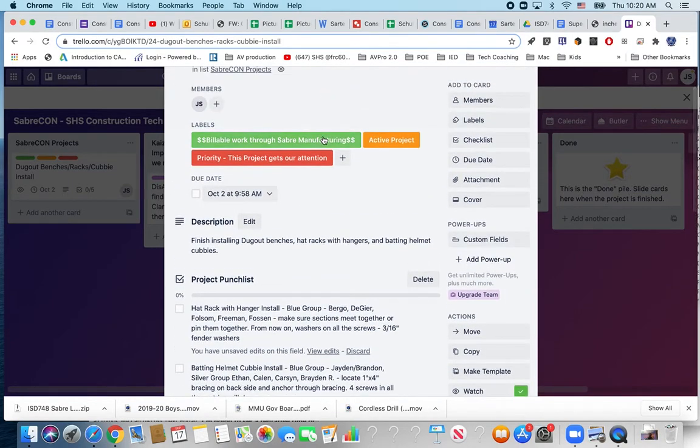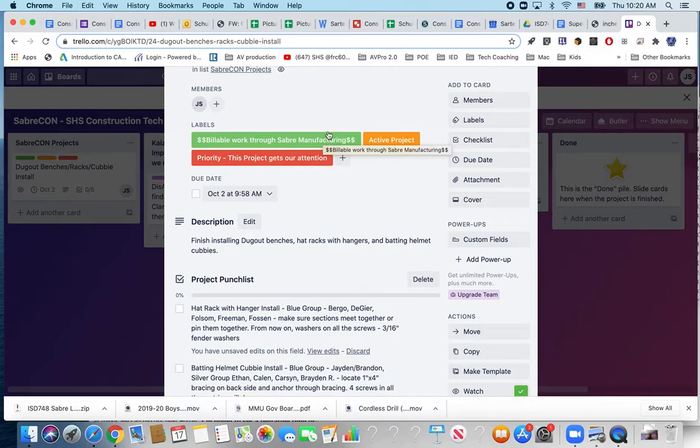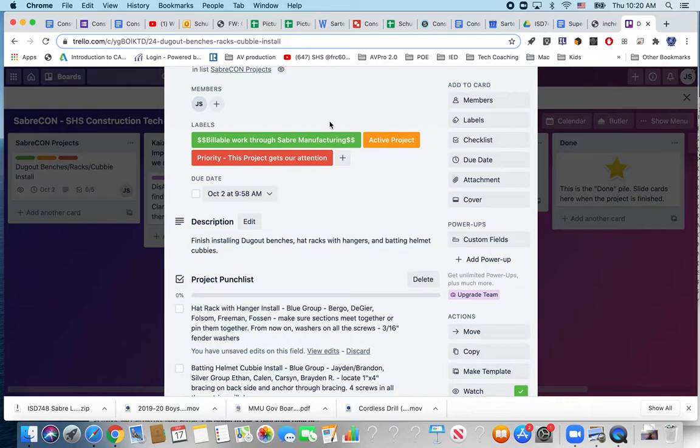We've got a few labels on here that are colored. Billable meaning we can charge for materials. We got about $120 in concrete anchoring supplies that we've purchased. It's an active project meaning it's orange and red means it's receiving priority right now. We are putting this first and getting it done.